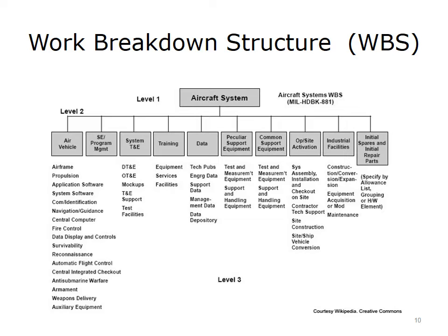This graphic illustration shows an example work breakdown structure. In this diagram, Level 1 is the entire project. Level 2 consists of task groups, and Level 3 consists entirely of work packages. It's typical for a work breakdown structure to have some tasks broken down into more detail than others, but in general, you want to be sensitive to how much detail there is and how many levels you have.